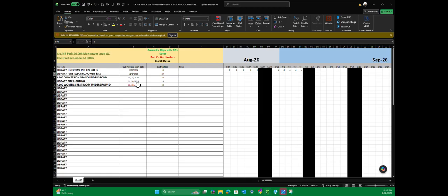You haven't even started anything over there, and you can go to those Tuesday meetings prepared. And that's the best thing about being proactive and being prepared: when you walk into these meetings, they may not even be aware of it. I mean, they throw these schedules out. Hey guys, I expect you to be here, and you can say, hey, 2 weeks from now or 3 weeks from now, you guys got me scheduled. It doesn't look like we're going to make it. What's going on? And you can add that in your daily report for any potential delays, or if there's another area that's going to start, you can go ahead and incorporate that into your schedule.